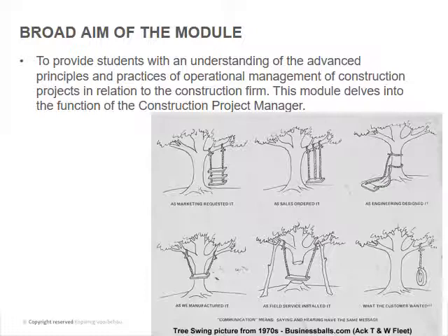Luckily we found the delivery note of the drawings, and it clearly stated that the site agent signed for it timeously before they actually started with those earthworks. So those are the things that really make a difference on a site. It's just that paperwork and getting those basic things right.